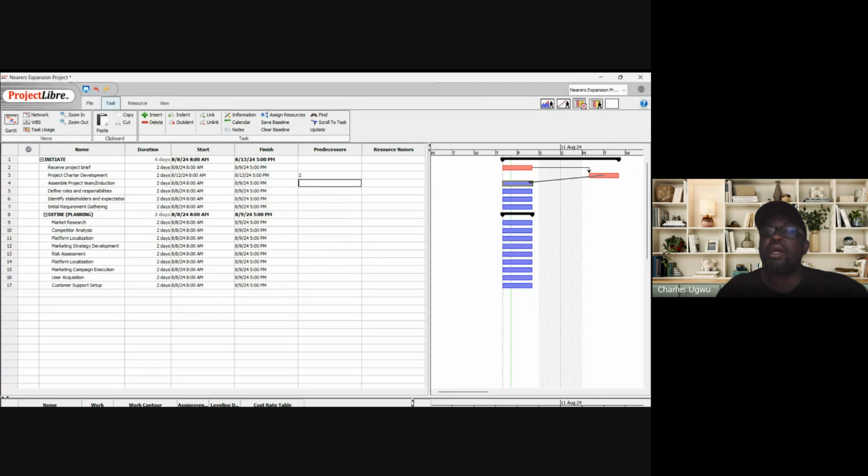You see the way I did it? You see, you have automatically added 3 now. The third, it means that the first one needs to finish, and then the project brief needs to finish before we start the project charter. And when the project charter finishes, we start assembling the project team.